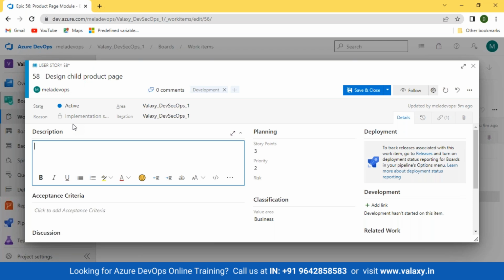In most of the projects, we do a daily estimation, or even hourly estimation. Depending upon the project, if you're using story point as hourly estimation, even that is not wrong, guys. It depends upon what type of project you're working on, what your Scrum Master is expecting, and how he's doing the estimation. If he's doing the estimation on a daily basis, then one story point is one day, and if he's doing hourly estimation, then one story point could be 1 hour. So it depends on how the estimation is happening.